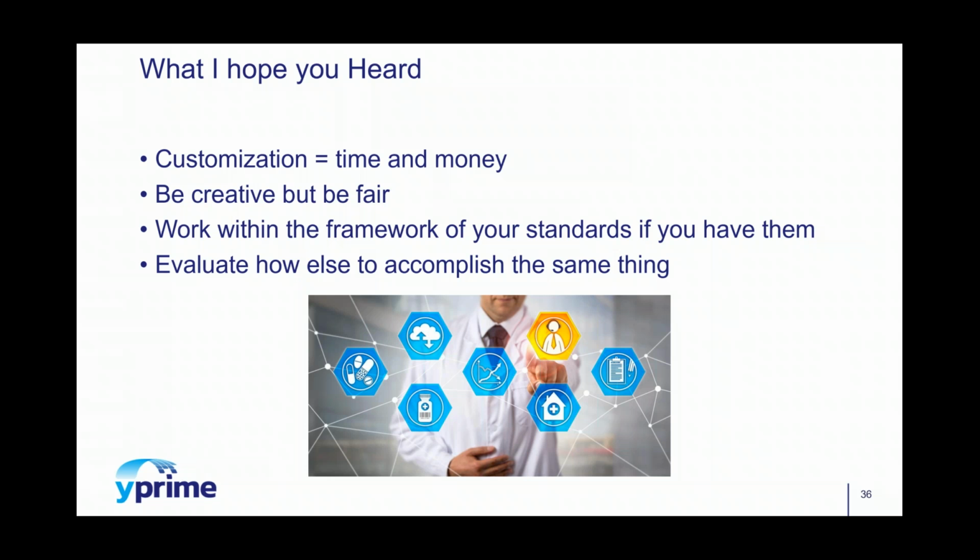So work within your framework, particularly your standards if you have them. When standards are in place, your ability to meet timelines, to reduce cost, and minimize risk will be incredible. And lastly, ask your provider. If you're asking for customization, is there another way that we could do this in a configurable manner inside of your system? As an example, maybe you want it to be magenta, but is there a way that we could make it pink? Because that would be good enough for us. Those types of questions can oftentimes avoid any sort of problems with study delays and increased costs and change orders.